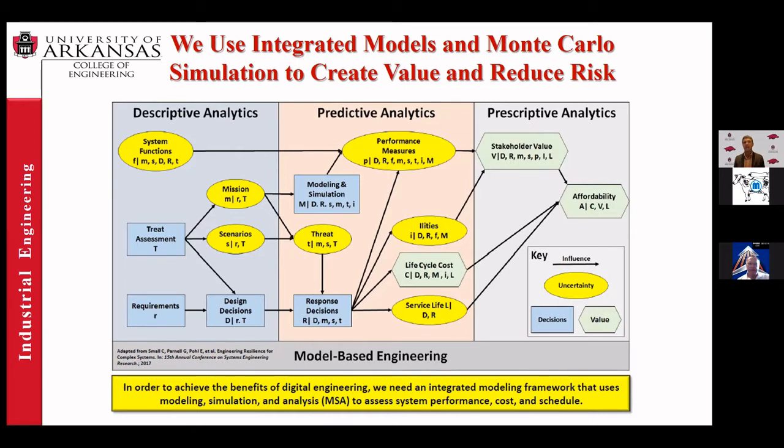And the benefit, of course, is that if you have a change in system functions, a change in the requirements, or design decisions, it will trickle through the entire integrated model, through all the other models and simulations, and you can see how those changes affect your end values. Especially if we use multiple objective decision analysis to define value and separate costs, we can look at affordability and show how much a certain value costs, right? And so that gets into that trade-off analysis.